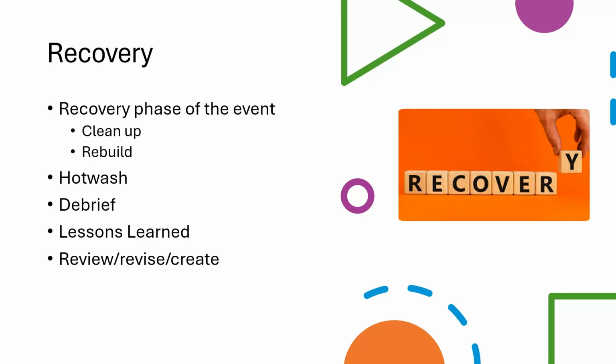Then you want to do a full debrief if it's big enough. And capture, here's what happened, here's what led up to it, here are the big milestones. We'll do a whole other session on how to do a debrief. But you want to capture all of that. And then you want the lessons learned. Quite often, and too often, it's lessons noted. So you don't actually put down, okay, here's the issue, here's the action we're going to take to correct it.